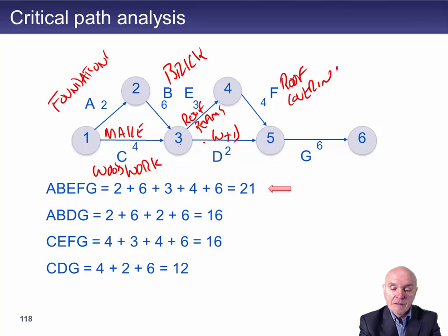So it depends where you live. It's going to be tiles or slates or some sort of roof covering. So you have your wooden beams on here, and now we're putting the waterproof covering on top of those wood beams. And of course, you had to have the roof beams on before you could put the roof covering on, because they're going to support the tiles on the roof.